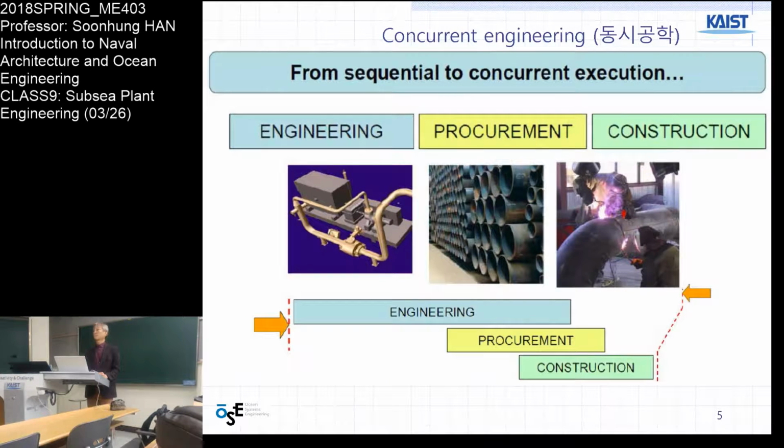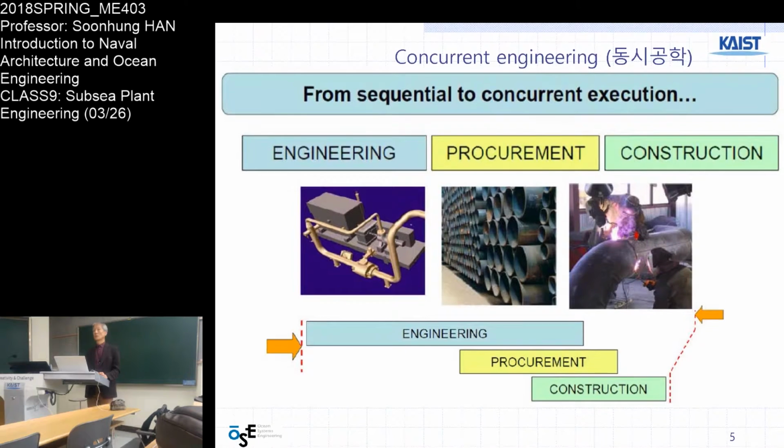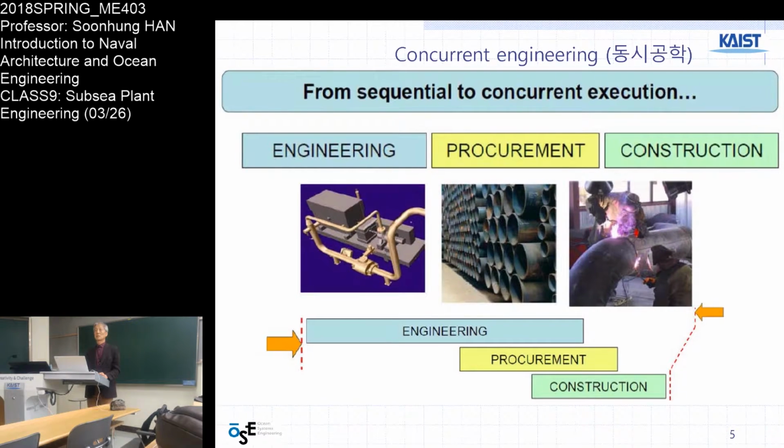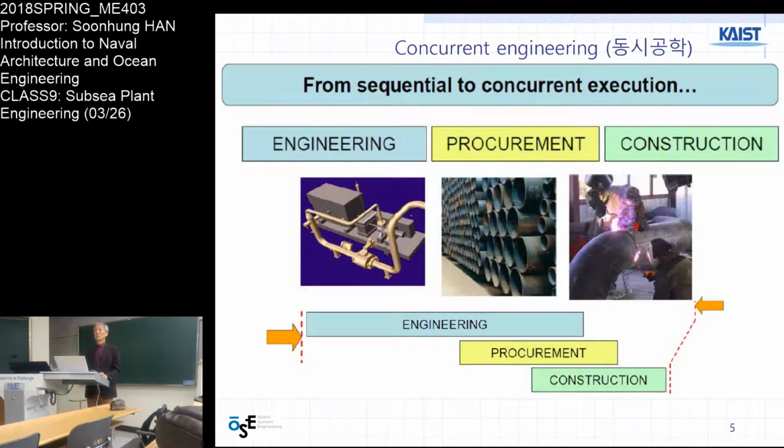Because procurement and construction should start before previous stages finish, there can be a change in design, a change in procurement item or procurement provider.